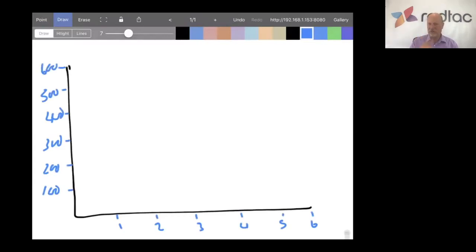One thing I would suggest to you in the real world is, and I haven't got time to go through this in detail, but story points are just a relative estimation approach. They are exactly the same as relative t-shirt sizes. The only difference with story points is you put a number on the relative t-shirt size. So they're a relative estimation approach. Now, story points can be extremely confusing for people. Therefore, what I'd strongly suggest to you, if you're going to use a burn-up chart, don't communicate story points outside the team, because you're running a risk it will significantly confuse people.